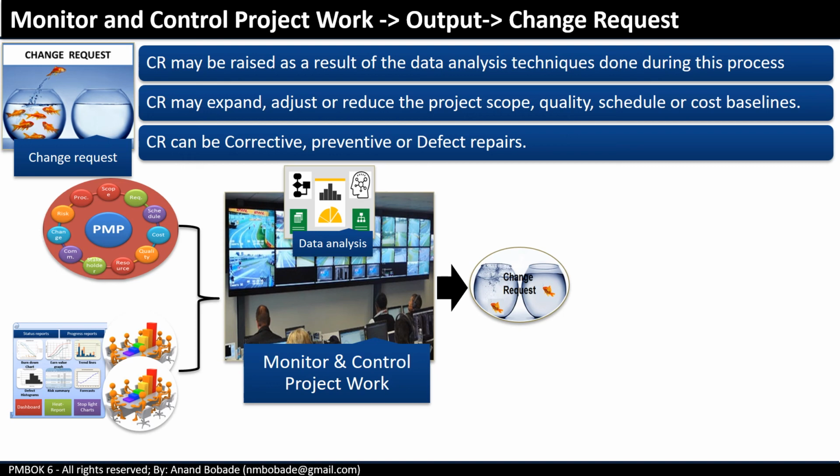Corrective action is used to realign the performance of project work with the PMP. Preventive actions ensure that future performance of the project work is aligned with the project management plan. And defect repair modifies a non-conforming product.